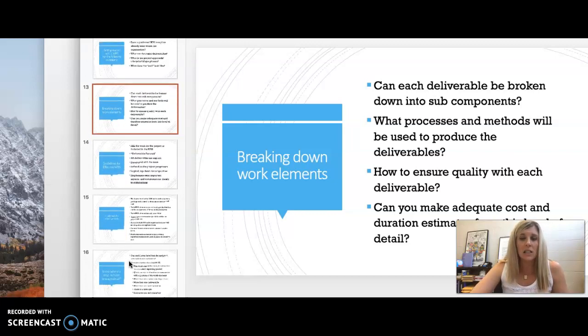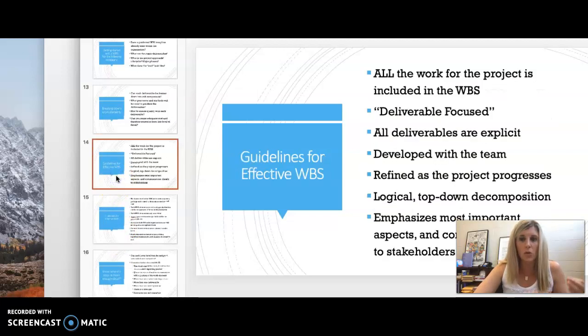So something to also consider when you're looking at the work breakdown elements, if you're breaking something down, it has to be broken down into where it is one deliverable with one owner. And I'm going to make sure that I show you some of those so that you can actually look at that. We're going to get into several of the deliverables. The work breakdown structure is usually developed with the team, because those who are actually doing the work should be developed with the people who are doing the work and approving the work.